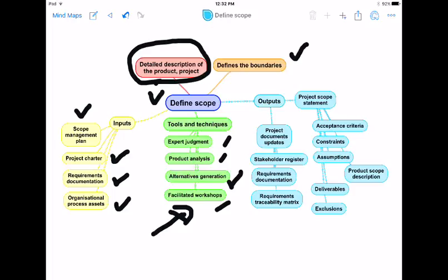From morning till evening, our objective was to validate the requirements. For each and every new requirement, we were asking questions like, who wants it, what is the purpose of it, what is the additional value it will bring in, and what will it provide which is not there in the existing system. So it was a facilitated workshop with the main focus to eliminate unnecessary features.